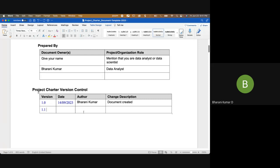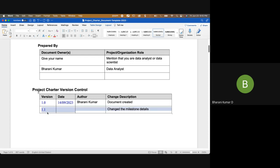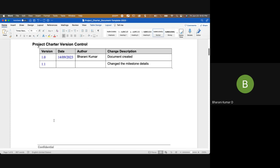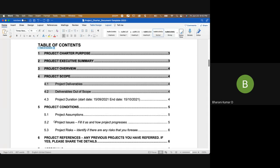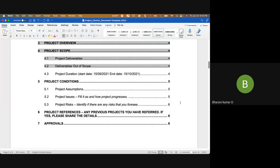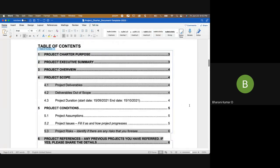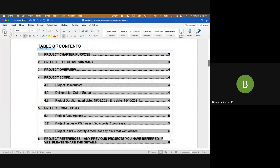You record the date, who made the change, and what change was made — for example, changing milestone details. If it's a major change you put 2.0 instead of 1.x. There's a table of contents; we removed irrelevant sections and kept only the relevant ones.